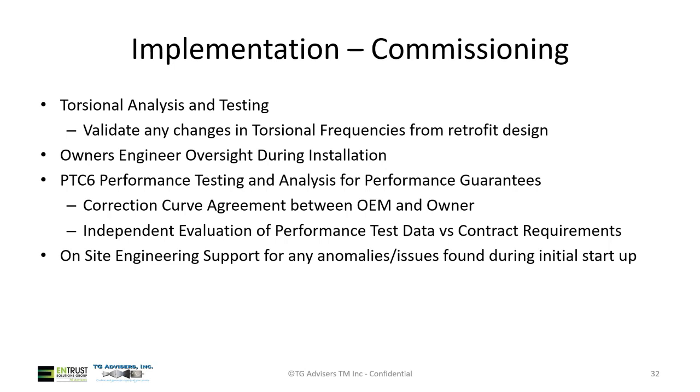And then usually, we get involved sometimes on independent evaluation of performance test data, but you can do your own performance test data if you have in-house expertise. Compare it to your contract requirements. Are you in agreement and everybody signs off that, yes, we met the performance, or no, we didn't, right?